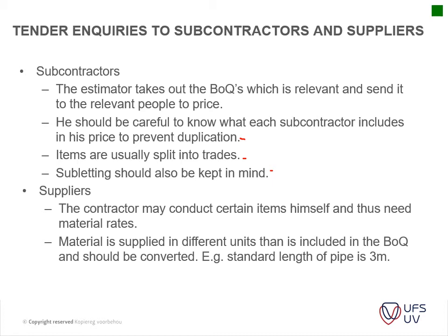Then the suppliers, the same principle applies to that. He sends out his BOQ for the material rates to suppliers as soon as possible. Then the material is supplied in different units than what is included in the BOQ. So you need to take that into consideration.